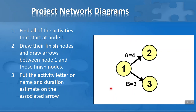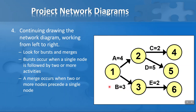Let's see how we build up a project network diagram step-by-step. We start by finding all the activities that start at node number one. In this instance, two activities start there — both activities A and B can start at the same time. Activity A ends at node number two, and activity B ends at node number three. We draw the finished nodes and the arrows between them: one to two for activity A, and one to three for activity B. We then put the letter and duration estimate on the associated arrow — activity A is four days long, and activity B is three days long. We continue drawing the network diagram working from left to right.